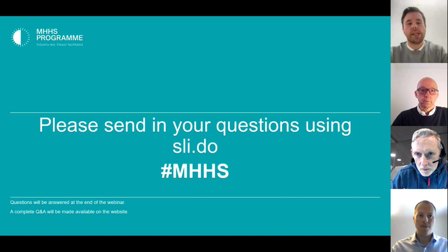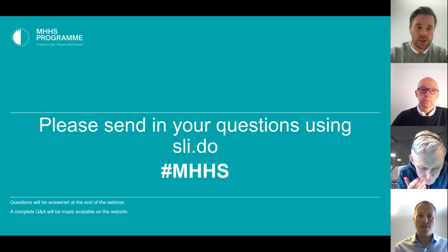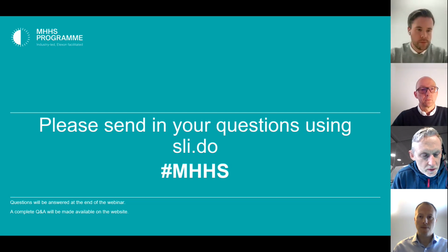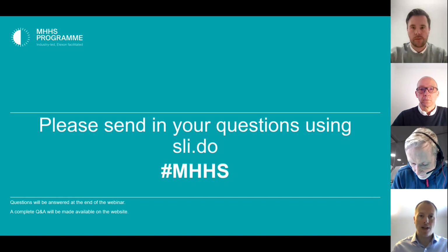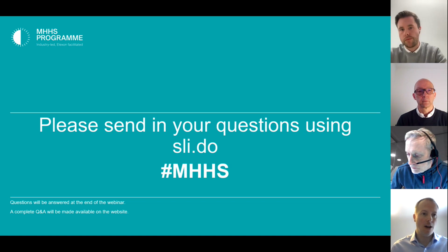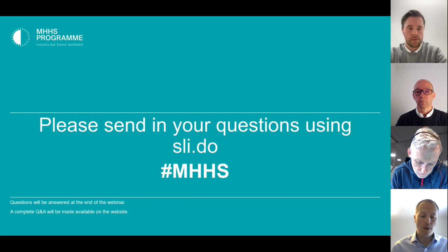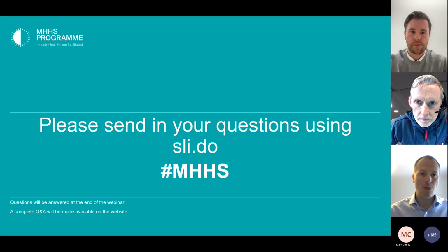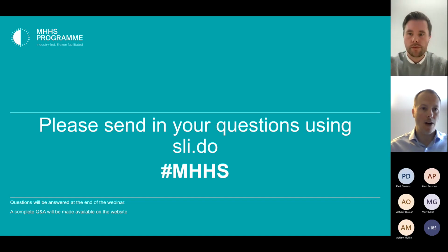Super. Do Avanade expect to need to make changes to the baseline interface specifications, as this could result in rework for participants? Do you want to answer that one as well? So yes, we do, because Avanade have only just come on board properly in about the last 4 to 6 weeks, so there will be changes to the interface specs. Just to follow up on that, any changes to interface specs or anything related to interfaces will be processed in alignment with the governance within the program, through the relevant forum for review and approval, and will go out to the industry through those relevant bodies before they go for approval. So things won't be made on the fly. The correct governance processes will be followed, and that will include industry forums to get the right levels of engagement that we need.